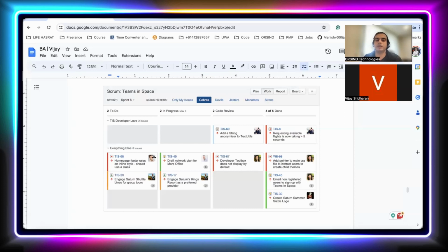So now the individual person who got assigned, we call the owner of that particular bug, user story or task, whatever the ticket type is. So this is the owner, and this is the responsibility of this particular owner. If this is, let's say, a 3-pointer, and this person has started working on it, ideally within 2-3 days this task should get closure. And if it is not moving ahead, and you are just playing the role of the BA, then it is your responsibility to make sure he is clear and has all the access regarding the requirements, and there is no dependency on you.